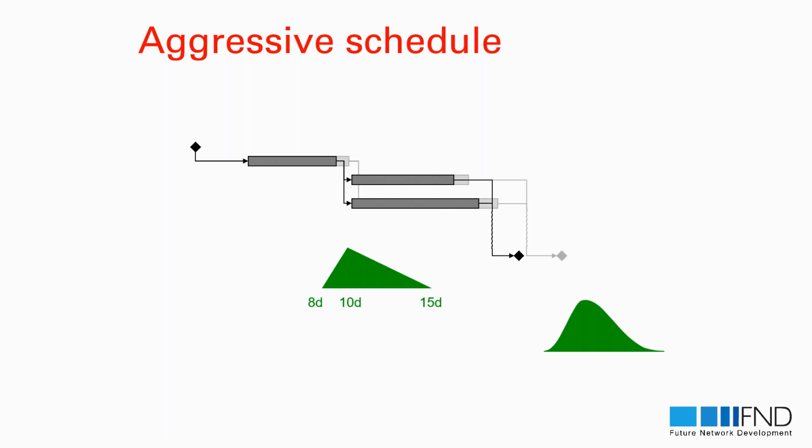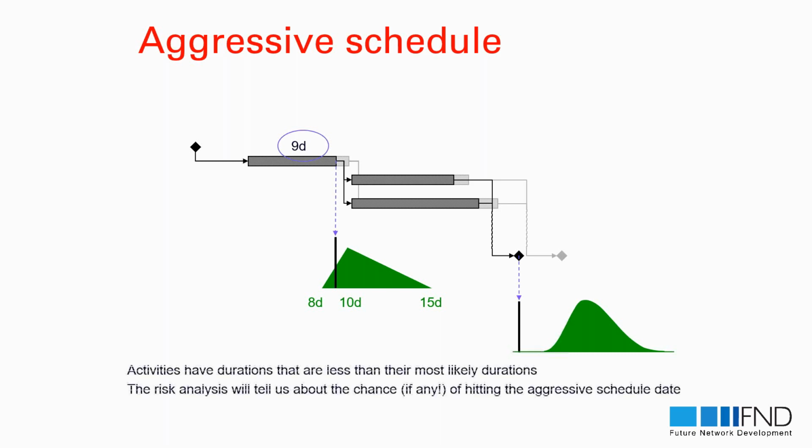So it's 30% all the time he's cutting, so if the subcontractor and team members find out this is the technique the boss is using, and this is unrealistic and not achievable, nobody will respect the schedule. So this is the disadvantage. That's why it's very important to have a realistic push and a realistic aggressive approach for the schedule.